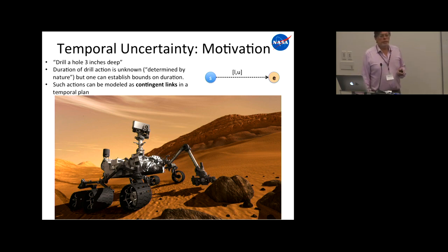Now, the duration of that action is really unknown. You may know it within certain boundaries, but in fact it's nature, in the form of the density of the rock and the condition of the drill, that tells you when you've got 3 inches. It's not as if you can say this is going to take exactly 7 seconds. In most cases you really don't know how long it's going to take, but you may have reasonable knowledge of the boundaries. It may take at least a minute, and it'll probably not take any longer than 15 minutes.